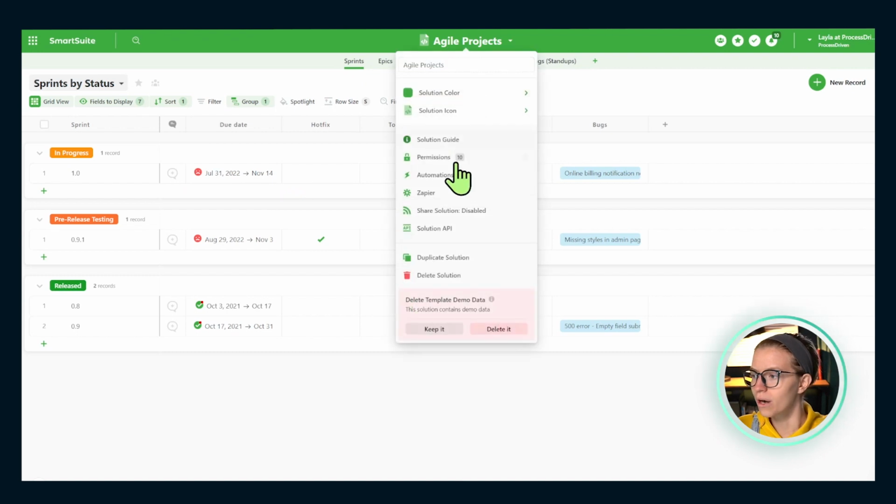If we were running an Agile project, we would take the time to either automatically, using an automation, or manually create new sprints for each chunk we decided to plan. So if we're doing it every 2 weeks, we do it every 2 weeks. If we're doing it every month, we'd create one for each month. We create the sprint containers, the empty boxes in advance, and when the sprint actually arrived, we do whatever kickoff and wrap-up steps we do, as well as work on the given sprint stories and bugs that we've identified.